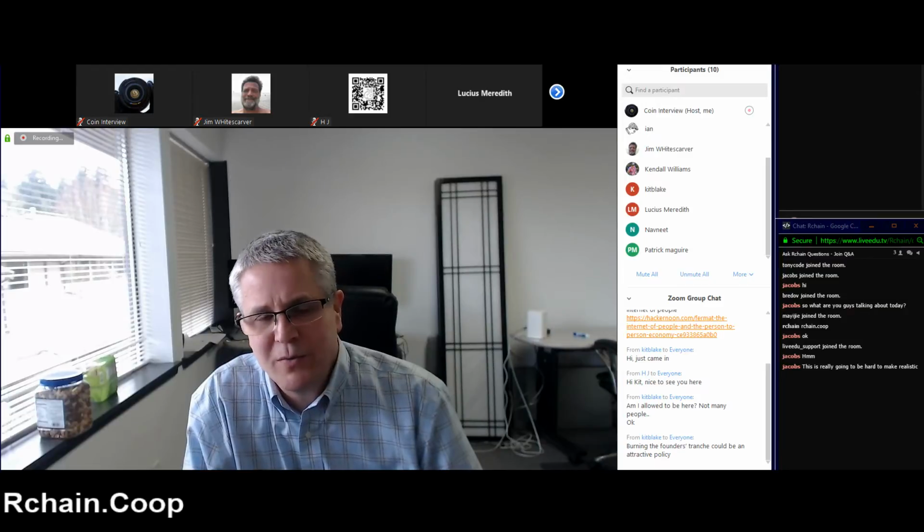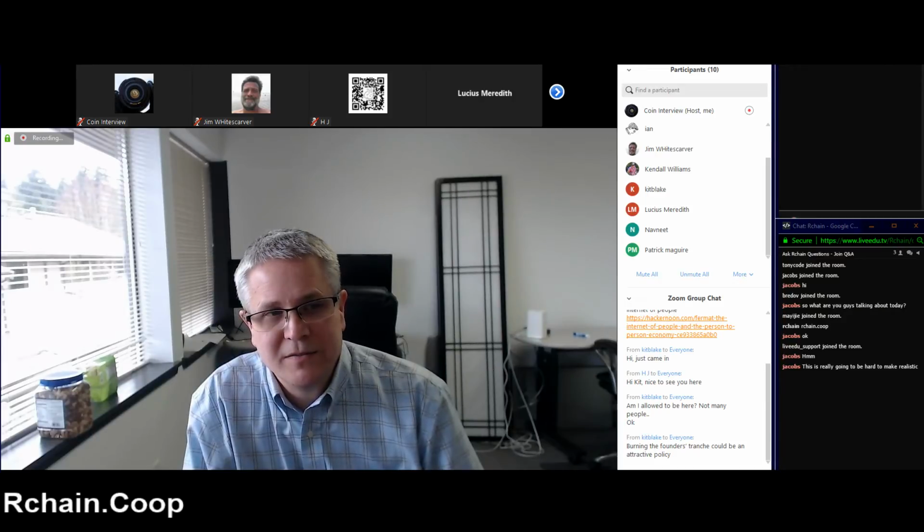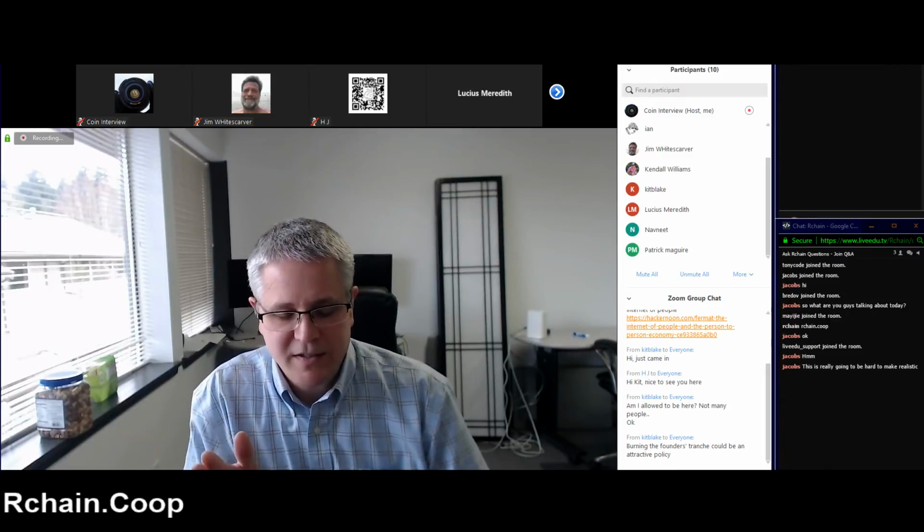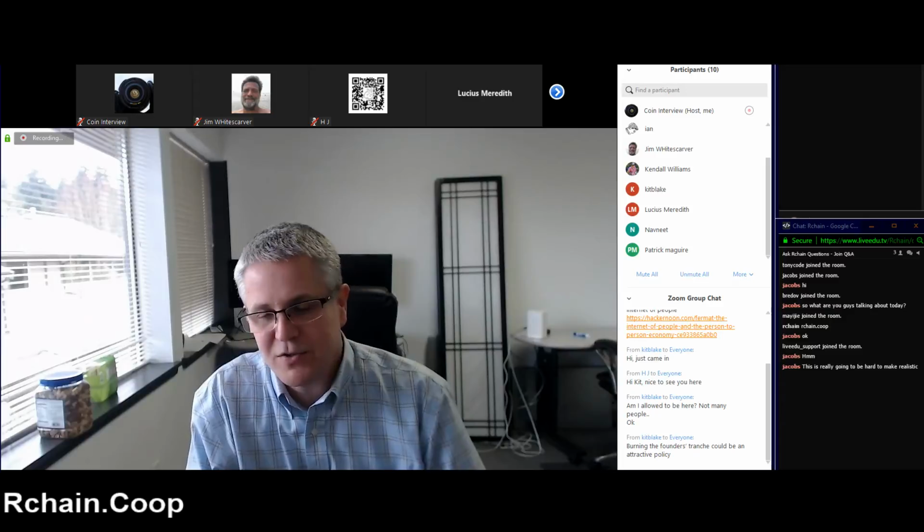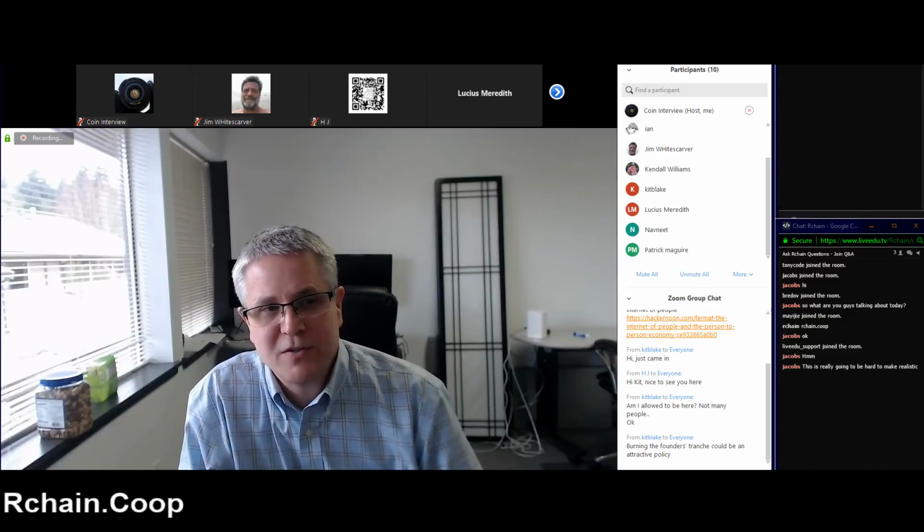I've done a little bit of work on what I'm calling the work breakdown structure for what needs to be delivered for the platform. Greg, Navneet, and the other developers and I have some more work to do on that. It's really a list of components, and then we will do a rough cut on that against milestones, and also enhance it with usage: a combination of use cases or end-to-end scenarios that need to be demonstrable across those components.